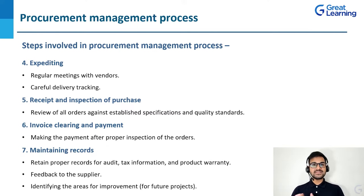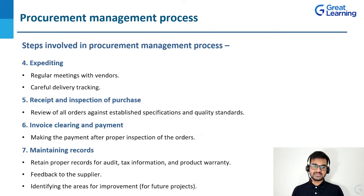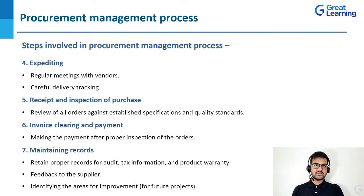If the quality and quantity standards are not met, you talk to the vendor again to make sure they follow the required standards and timely delivery. Once everything is good to go after inspection, you make the payment — invoice clearing and payment is done. Last but not least is maintaining records, which is important for audits, tax information, product warranty, giving feedback to the supplier, and identifying areas of improvement for future projects.